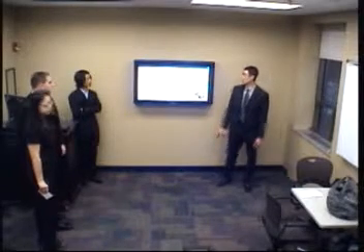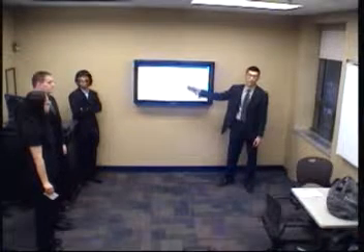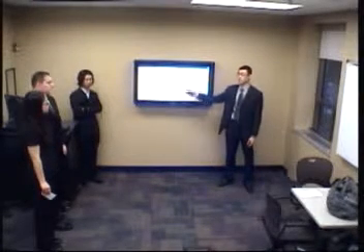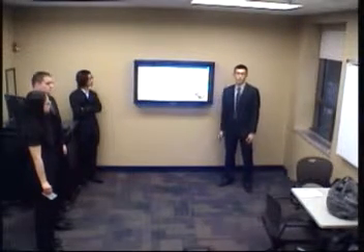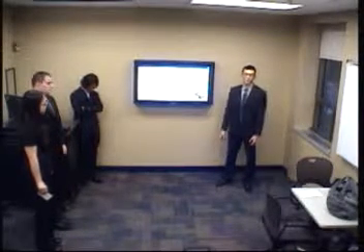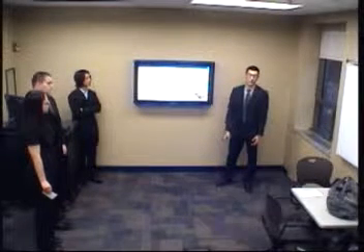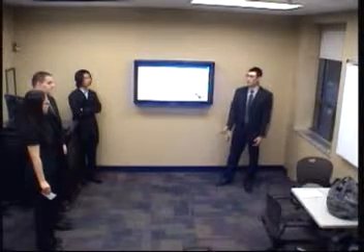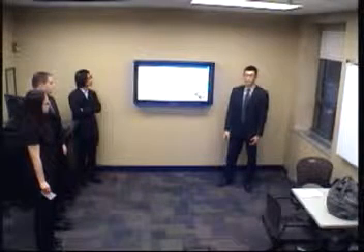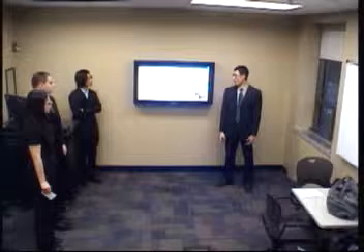And then I'm going to talk about our procedures. We're going to have weekly meetings each Friday afternoon. We are going to communicate with our project managers. You can talk about problems that you may face or something that you achieved in the last week, and the project manager should give you some new tasks for the coming week.